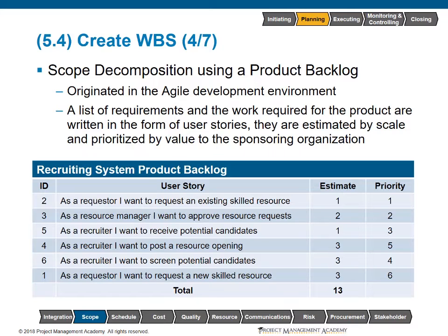We might be spending entirely too much time trying to figure out exactly how long these various user stories will take or how much these barnyard animals weigh. Instead, I might just look at you and say, from heaviest to lightest, cow, pig, chicken. And right there, we just did relative estimation.